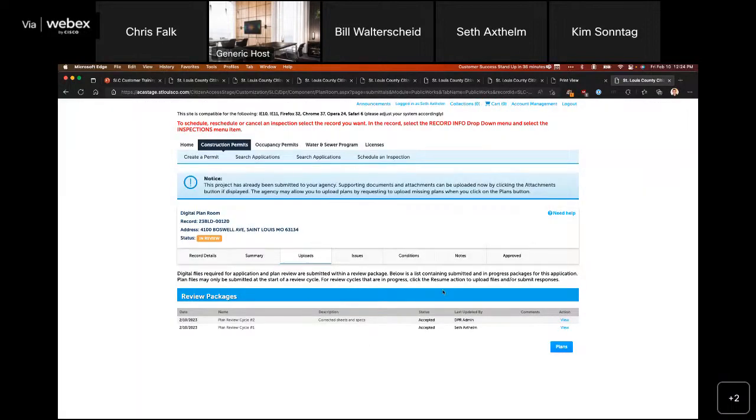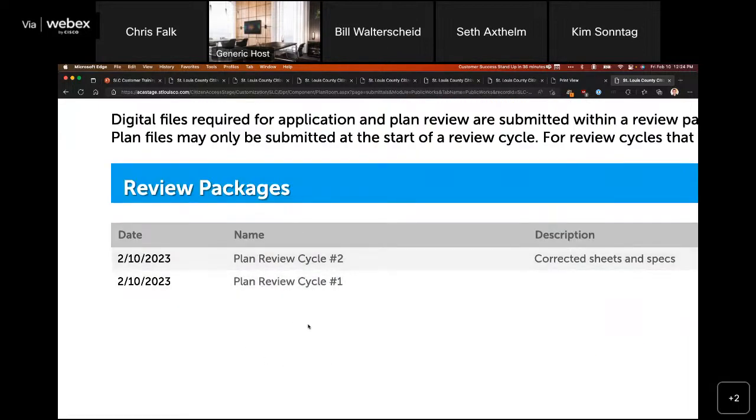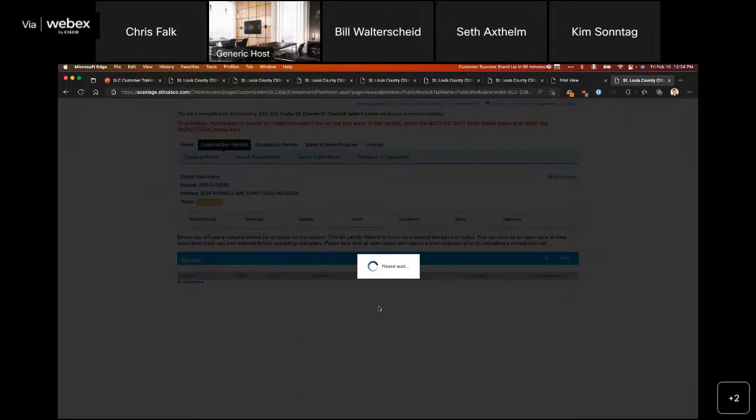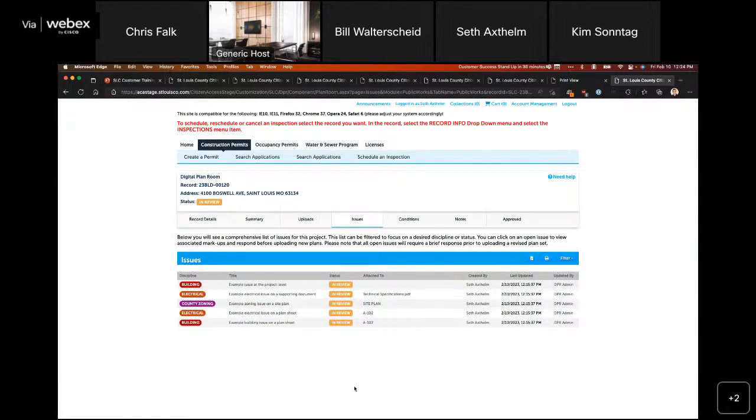Over here we have the uploads tab right here. And this is where each of our review packages are going to be listed. Then we have our issues, where we spent a good bit of time. So those are all going to be the issues that we've responded to. We'll notice that all those issues are now in a status of in review. And so they'll stay in that status till each individual reviewer completes their review. And then at this point, they'll either turn green and have an accepted label, or they'll turn back to red and flip back to an open label if it's coming back to you with additional comments.